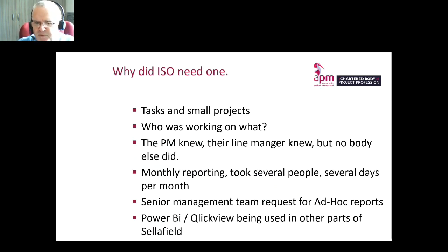Also, when it comes to monthly reporting, within the business, we were using Power BI and QlikView, but again, this tended to be limited to the major projects. And the amount of reporting we were actually doing on ISO, because we have a large number of small projects, and when it comes to period end, it was taking several people several days per month. So they wanted some way of automating this system. And also senior management within ISO would be asking for certain ad hoc reports. And again, they could take a few days to actually get the information we wanted.